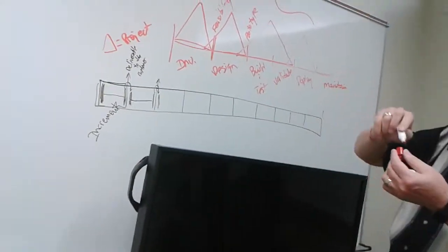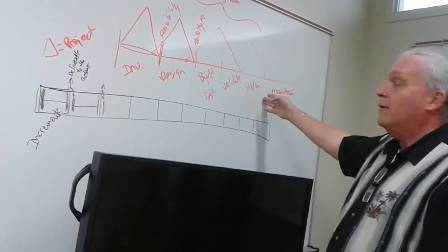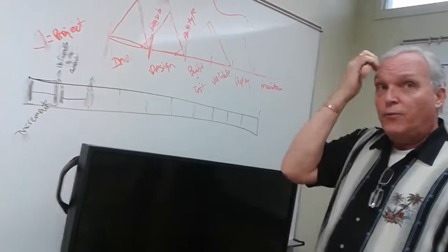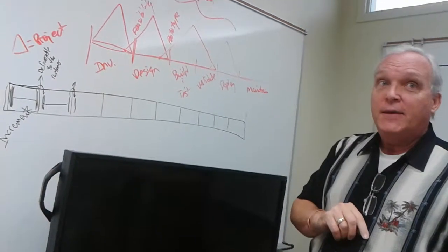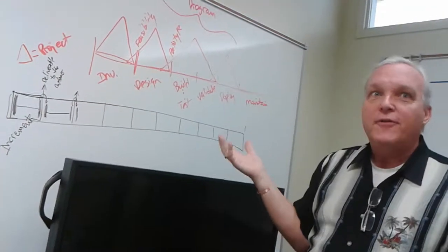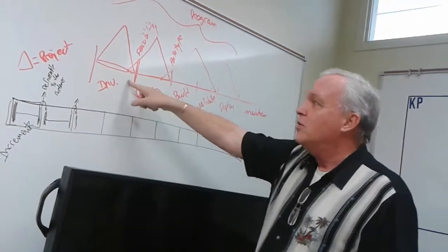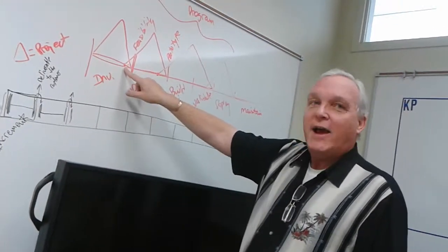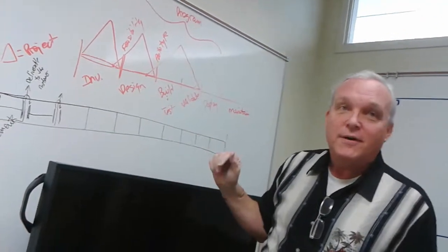If it's something that an organization has done 1,000 times and it's time to do it again, and you know what the end looks like, you can do all of that in one single pass through that process. One of the things I tell project managers: never detail plan past your next point of knowledge. When you're working on something you've never done before, you have no idea what this looks like. So all you know is this: detail plan that, and that's your project. And then at this point, decide how much more you know, and then plan the next phase of what you know.